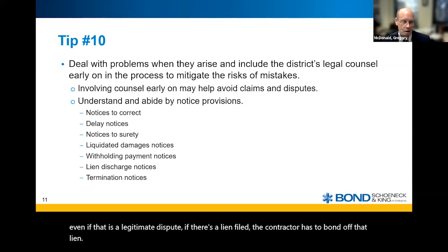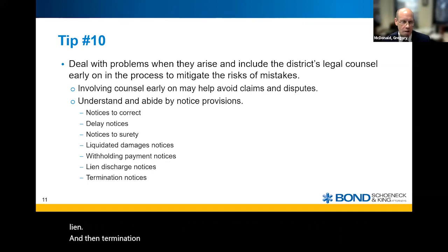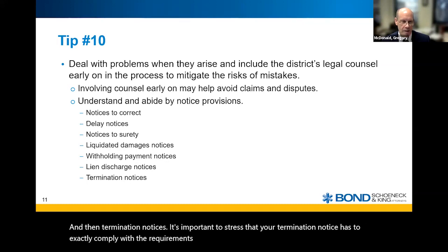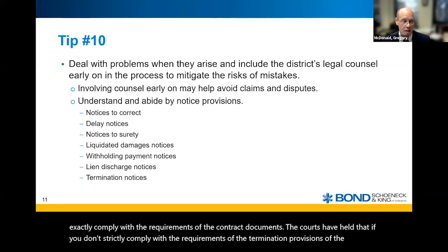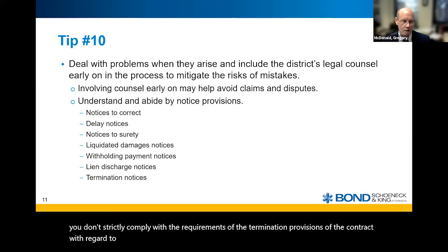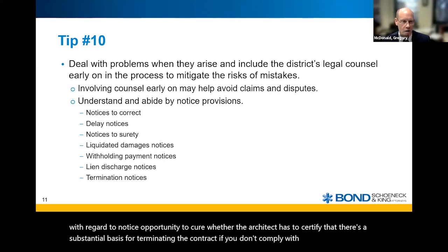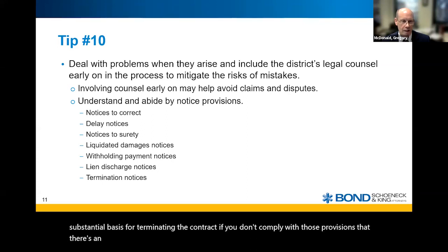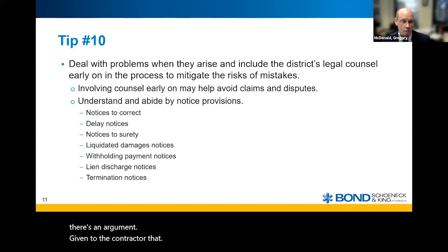And then termination notices. It's important to stress that your termination notice has to exactly comply with the requirements of the contract documents. The courts have held that if you don't strictly comply with the requirements of the termination provisions of the contract with regard to notice, opportunity to cure, whether the architect has to certify that there's a substantial basis for terminating the contract, there's an argument given to the contractor that that determination was wrongful.